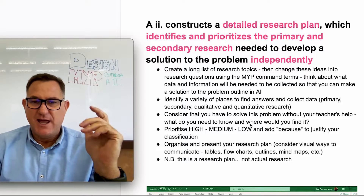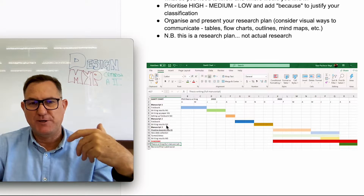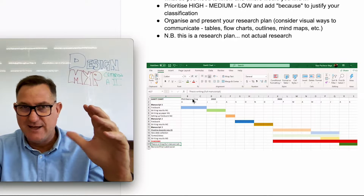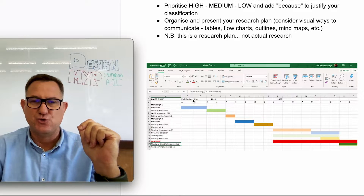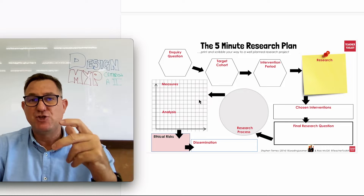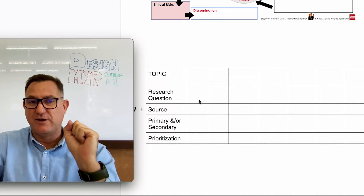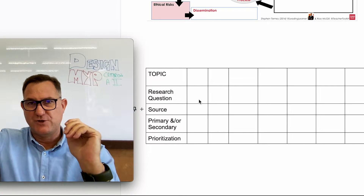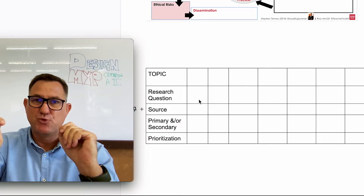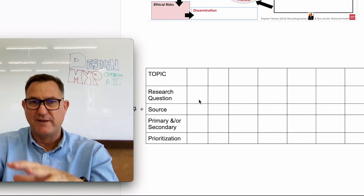I've got some examples here of research tables. One style is called a Gantt chart — on the left you have your topics, and you can organize them by priority and also by time, showing when and where you're going to do each piece of research over the course of lessons or days or weeks. Another format is a simple research table: list your research topics, rewrite them as research questions, state your sources in as much detail as possible, identify whether it's primary or secondary, and then add the priority — high, medium, or low — and why.